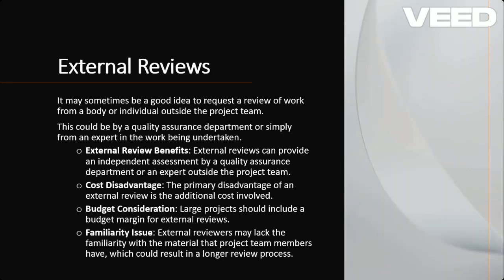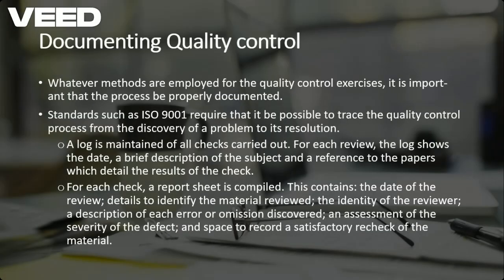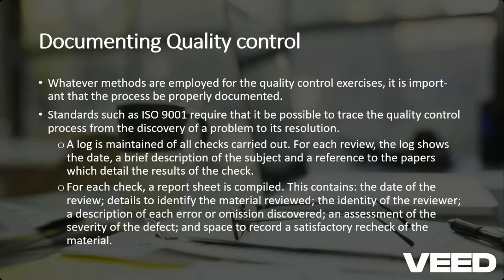And as you are conducting your reviews, you don't conduct them for the sake of conducting, as has been highlighted by the Fagan inspections. You need to document what you have found, what errors were found, how they were dealt with, who was the author, when was it reviewed, when was it corrected, when was work signed off, is it a team leader review, peer review, check, and so on and so forth. So there are a number of tools which we can use to document. So we have these.